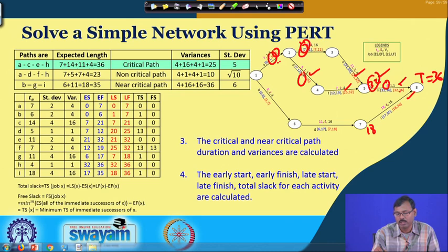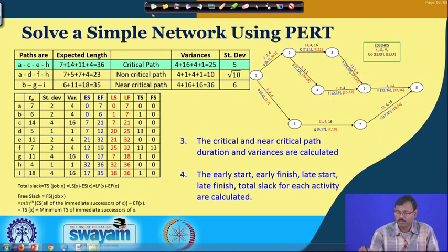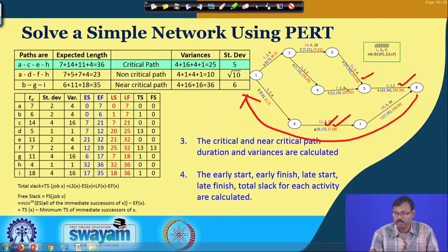Here, instead of this, 20 minus 7 is not considered, it is having some slack, we can understand. So, in the backward pass, considering T is equal to 36, we have gone, and those late finish, late start times are given in the red color separated by commas under the third bracket associated to each and every job.